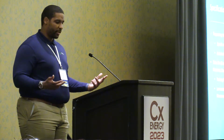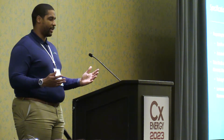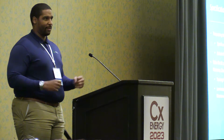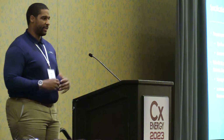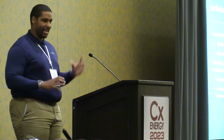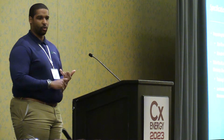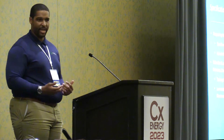And like I said, in Division 1 specs, training. This is my favorite because sometimes you'll have one standard training. Do we need a hands-on training, or is it just in a classroom setting? My biggest thing is I was working at a hospital out in DC, and we were working on some of the load shedding sequences. And the biggest thing was we had to actually put a visual diagram of what areas will be affected during a load shed, so the facility guys can know exactly where to go and who won't have power.